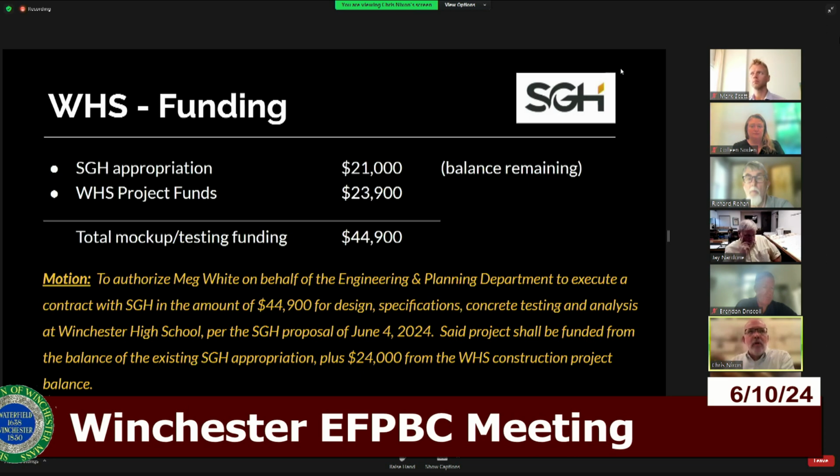So this is why in Jenny's presentation to us at the last meeting, there was a line item for the corrosion inhibitor applied, and I think she called them the accessible spaces. And then there was a much smaller line item for what they call inaccessible spaces, in case there's a contractor who can, I don't know, spelunk their way into a peculiar space and do the work. But she did assure us they've gotten their eyeballs on the vast majority of the space and feel like at least 90% is accessible to get the work done.